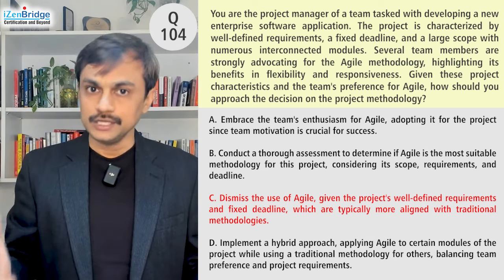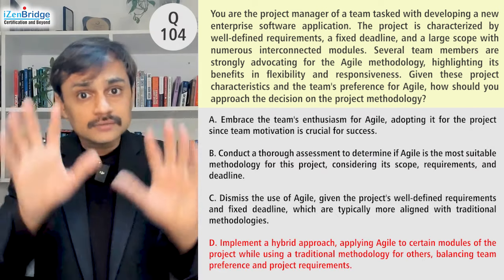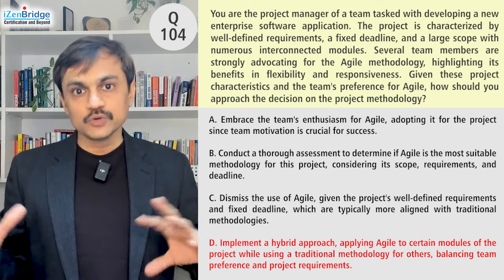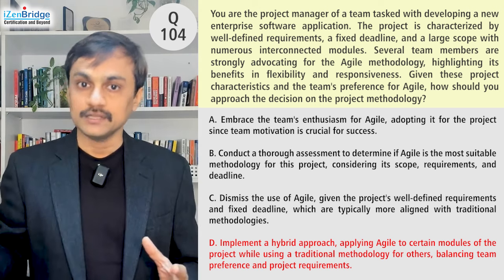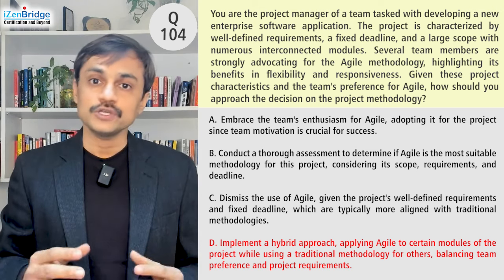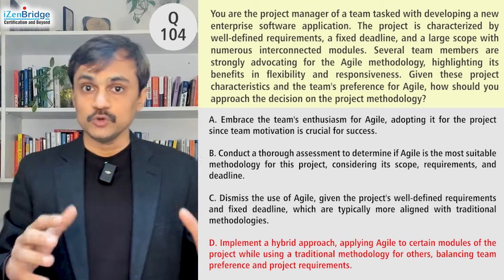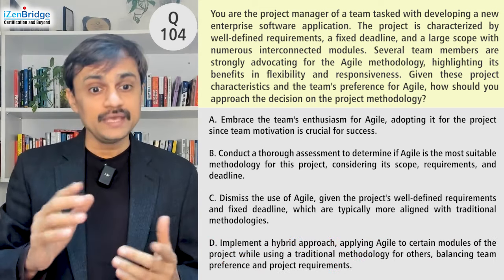Option D: Implement a hybrid approach, applying Agile to certain modules while using a traditional methodology for others, balancing team preference and project requirements. This could be the final conclusion — most likely you will go with a hybrid approach, since the project shows some characteristics that benefit from incremental working, while others point to predictive working. However, the issue is that Option D is a direct recommendation, assuming this is how it will work. So B and D are very close.